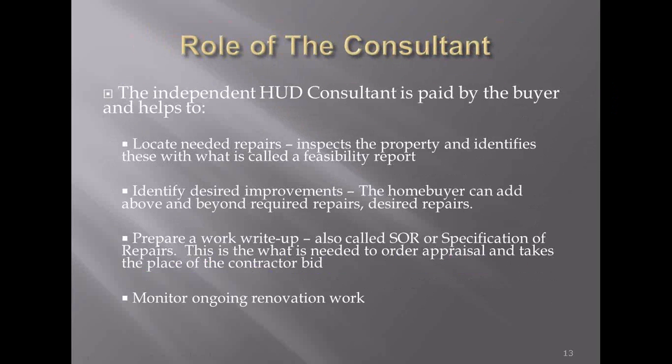The consultant will identify any desired repairs the homeowner may want to add above and beyond the required repairs. They prepare a work write-up, also called an SOR, or specification of repairs. This is what's needed to order the appraisal and takes the place of the contractor bid. So on your streamline, you have contractor bids. On the full 203K, you have the work write-up, or the specification of repairs. And then they also monitor ongoing renovation work after the loan closing. They are also a resource for their buyer.